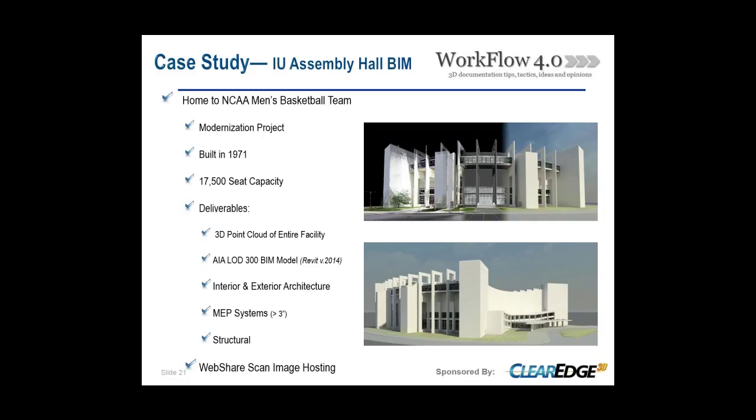So a $40 million modernization project was started this year from a donation, a very, very generous donation. The modernization would include a new south lobby, a grand entrance to the arena, which doesn't exist today, the addition of luxury box seats, concession and bathroom updates, a new scoreboard, and behind the scenes HVAC and other critical MEP infrastructure was going to be upgraded as well.